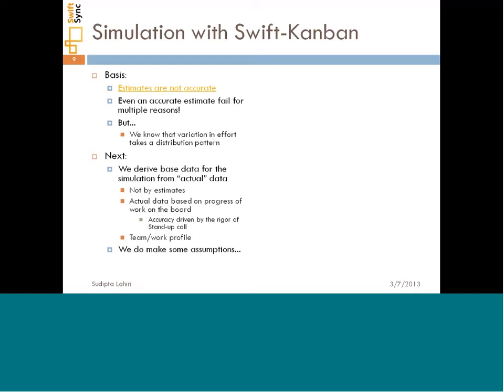So what we do is that we derive a set of base data from the actual work that has progressed on the board. We take the current inventory that is available on the board at this point of time, and we take the team profile that is available on the board at this point of time. We make some simple assumptions.